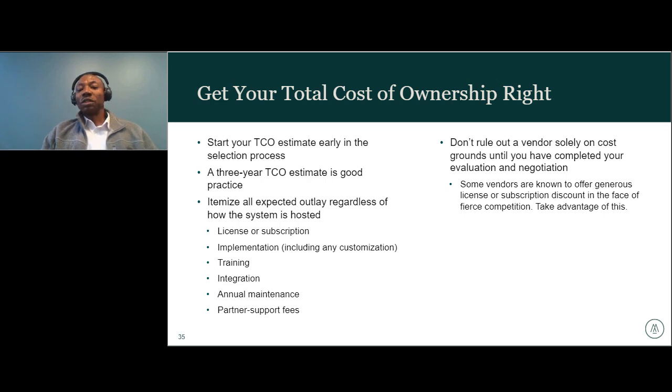And one quick note is not to rule out vendors solely on cost grounds until you have completed your evaluation and negotiation. And the reason for that is some vendors are known to offer generous license or subscription discounts in the face of fierce competition, and you want to take full advantage of this.